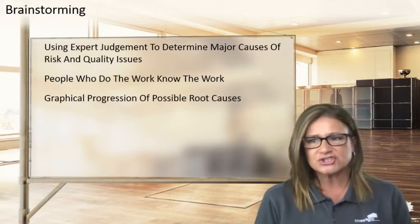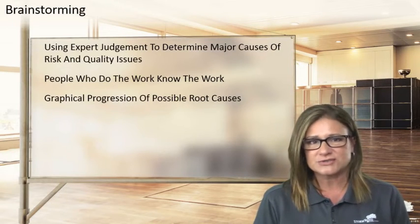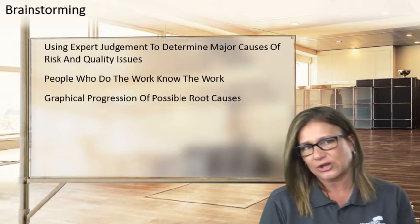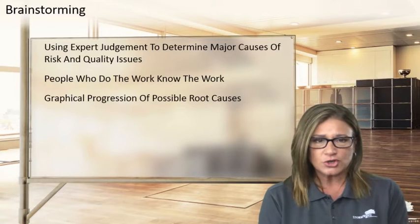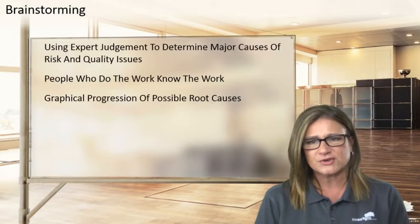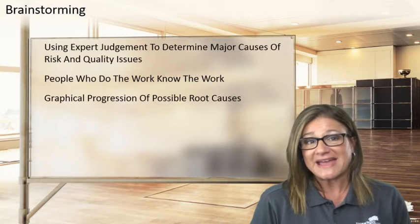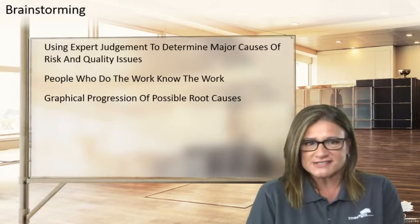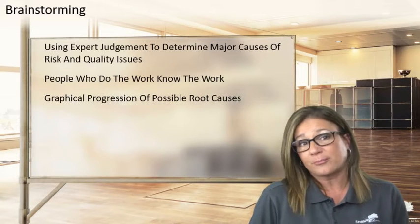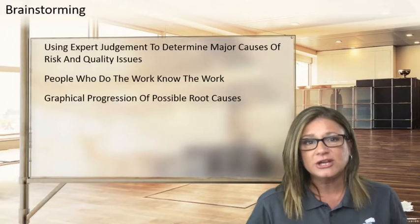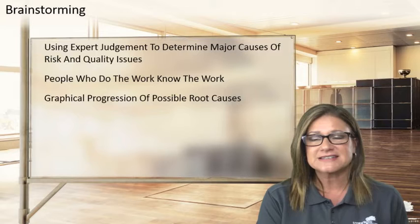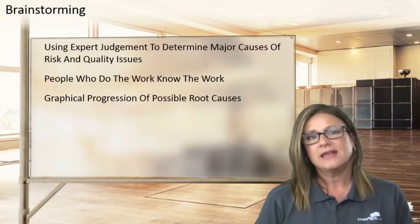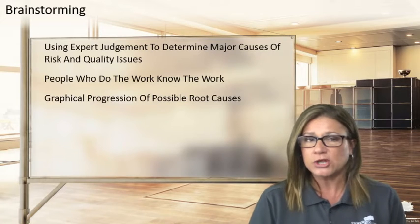To identify root causes of risk and quality problems, you'll need to work with your experts and your team to determine major causes. Sometimes those are industry-specific — like technical, mechanical, or machinery-related. The people who do the work know the work, so they're the best people to reach out to for brainstorming — to figure out not just the categories but the potential root causes, and work through the progression of a breakdown like an Ishikawa diagram so you can graphically represent possible root causes and apply the best response to the actual root cause.